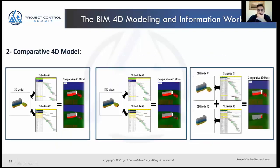The second type of 4D modeling is comparative. There are different types of comparative models. If we have one 3D model and two different schedules, we have two 4D models, which we call a comparative 4D model. An example: we have a project with the baseline schedule and the updated schedule, so we can compare them head to head.